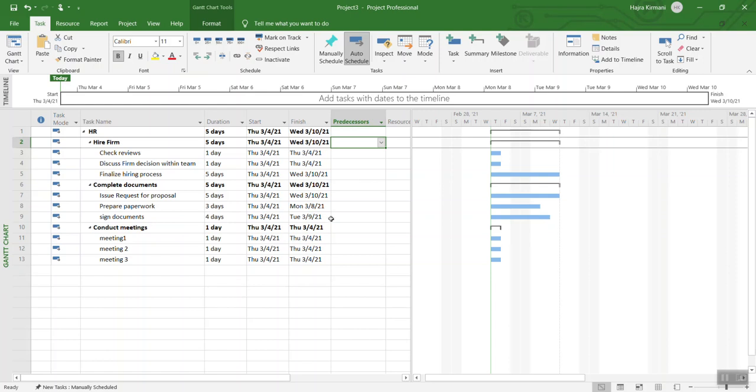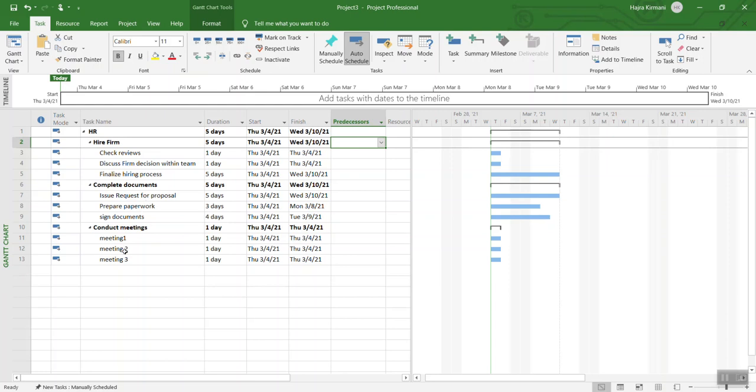If you read all these work items listed over here, you are going to realize that some of them cannot happen before the first or the other one finishes. For example, you are going to hire a firm before you complete any documents. Once you complete the documents, then you have meetings. You can have meetings about those documentation that you have already worked on. So there is no way that you can conduct the meeting first and then complete the documentation and then hire a firm. It has to be in a certain process.